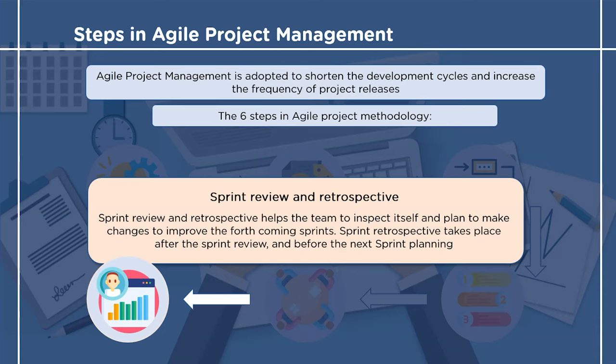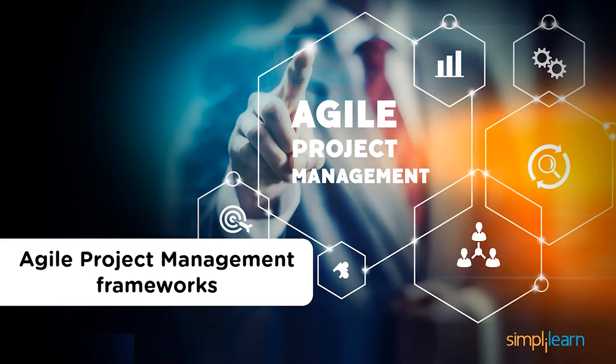The second meeting is the sprint retrospective, which involves the stakeholders discussing what went well and what went wrong during the sprint. The sprint retrospective takes place after the sprint review and before the next sprint planning.